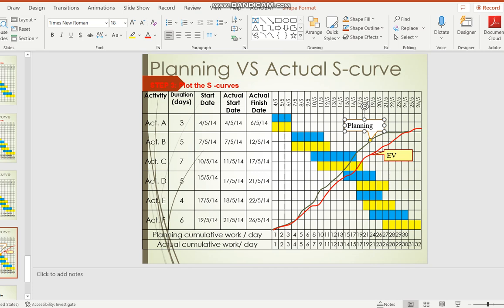At this point in time, what percentage are you putting down here, at let's say day 14? It's there already. So you put down all the numbers here, every month, every day up to this point. Then you add it up cumulatively and draw a line up to this point of 14. And then you take the difference between these two.